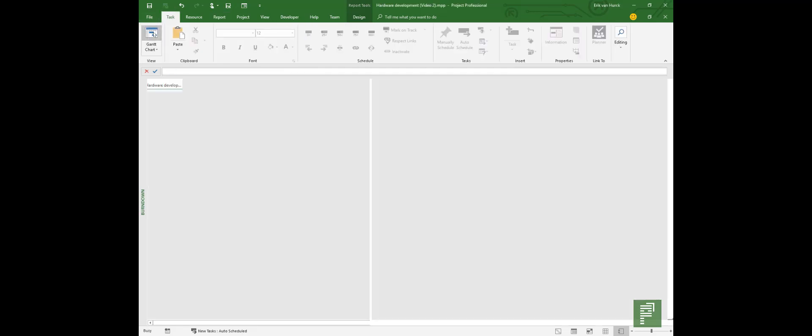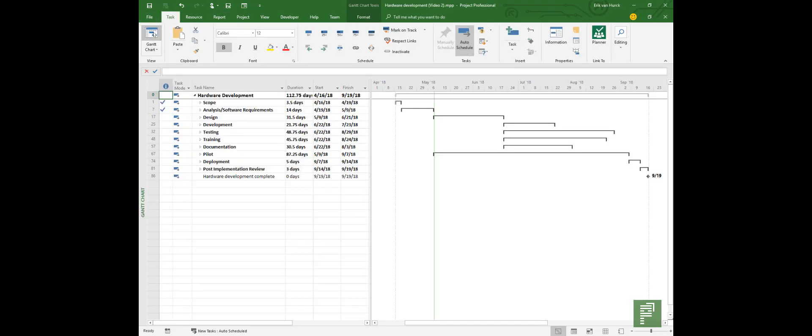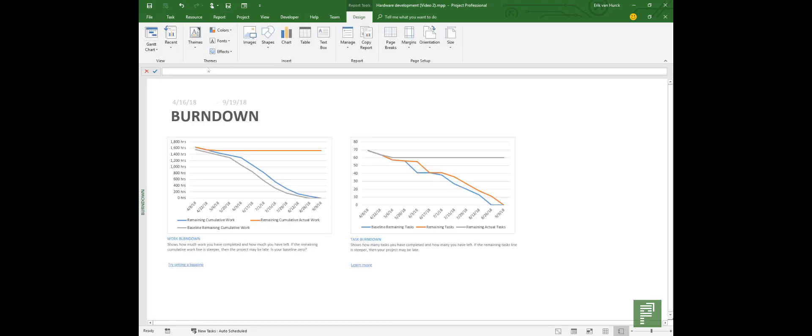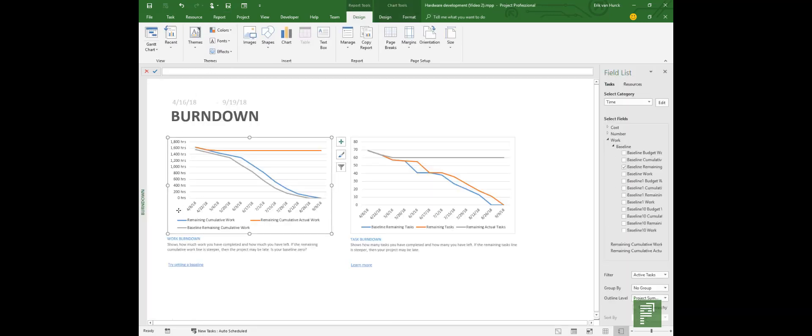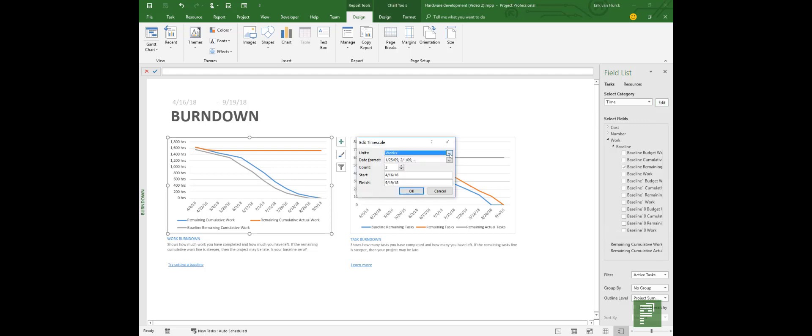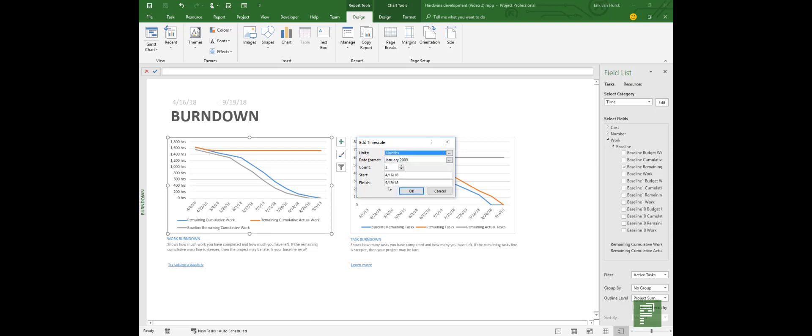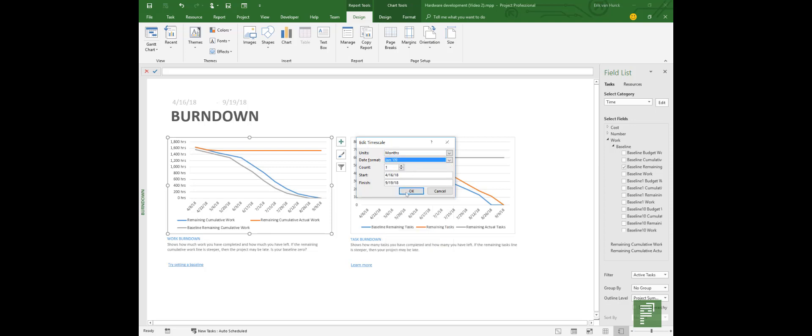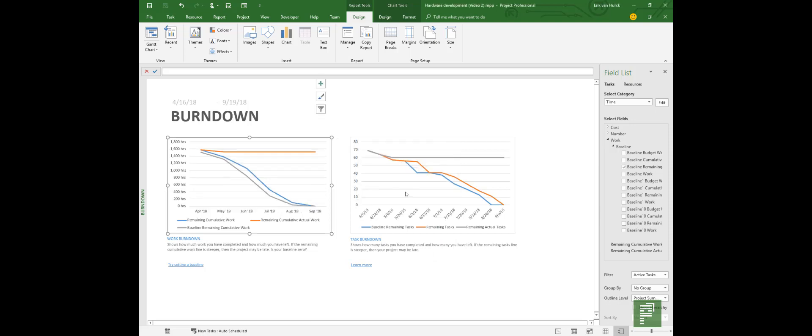So again we are in our hardware development project and this has everything we need for a good report. Let's head over to the burndown chart that we saw earlier and let's click on one of these visuals. Because on the right side you'll now have a field list and on top is the one that I want to share with you: Time. If you click on Edit you can set the units. So let's set this to months. Let's set the count to one because we want to see every month, and let's change the date format as well because that January 2009 doesn't sound quite right for such a small graph. So let's click on OK and you see that it's the same graph but it shows better data.